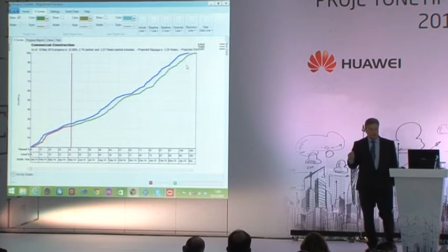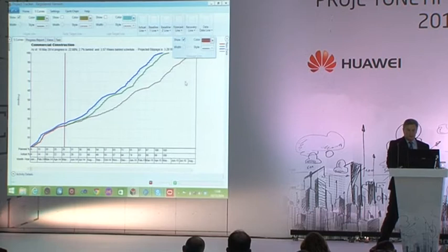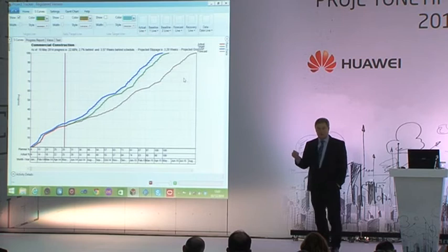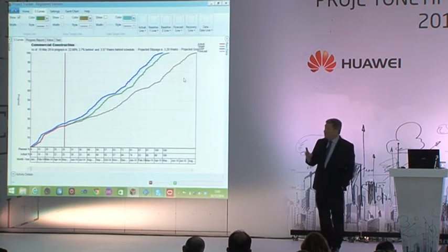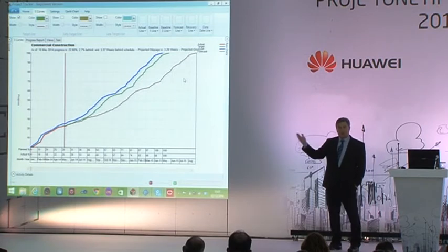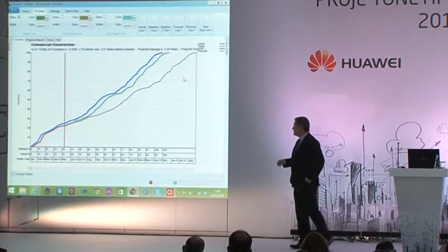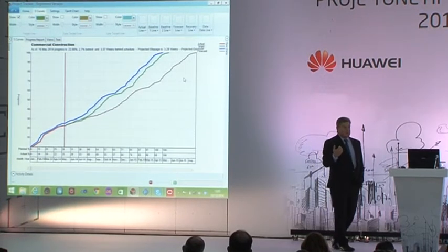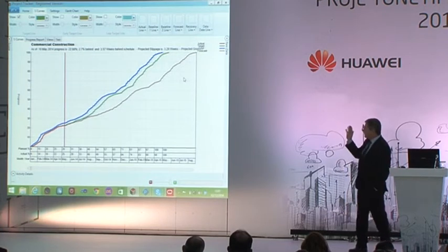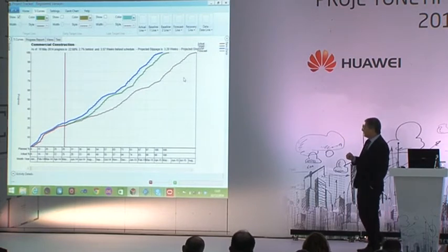So one thing that we've built into it is a forecast line, which basically takes the progress, the performance that we've done so far, and works that against the remainder of the project to say, well, where do we think we might finish? If we were to carry on at the current rate of working, you can see we're going to finish in August, which is not so good. That's like a 4 or 5 month delay. So that's a very useful extra curve that's produced.